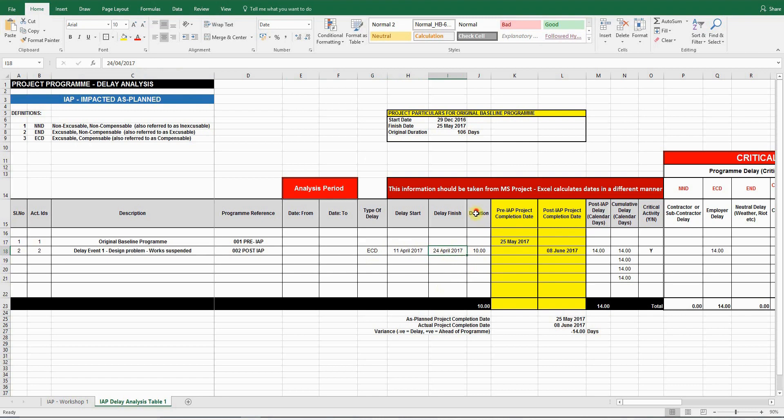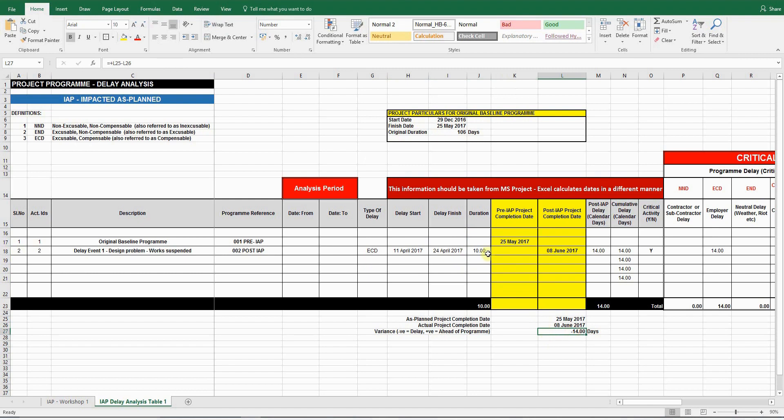Dates associated with the start and finish of the delay event. Now, this column is very important. It's the duration of delay taken from MS Project. As you can see here, it's only 10 days, even though the overall difference is 14 calendar days. These 10 days exclude Saturdays and Sundays, so it's 10 working days.